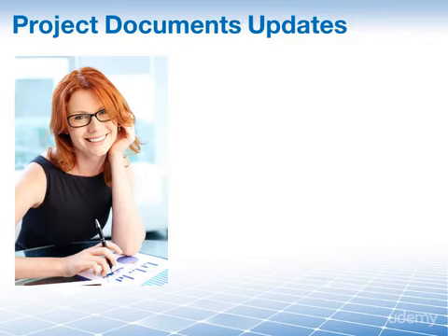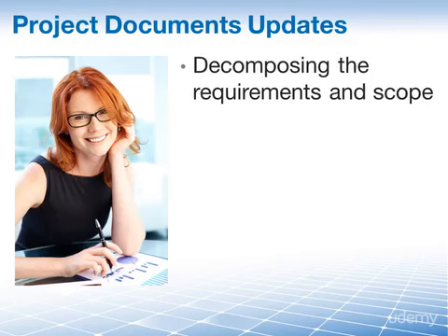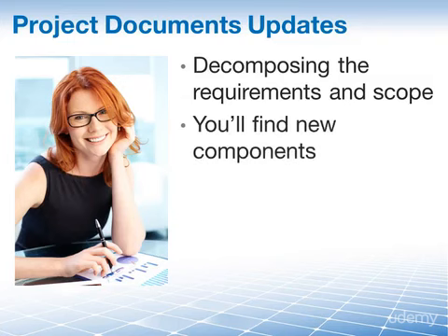Well, let's begin by taking another look at what happens during decomposition. During decomposition, we are taking a closer look at what it is going to take to deliver the scope. So what do you think is going to happen if you begin decomposing the requirements and scope in order to create your WBS and WBS dictionary? The answer is you are going to find new components, or you find that you can remove others where there may even never have been a requirement that came up.